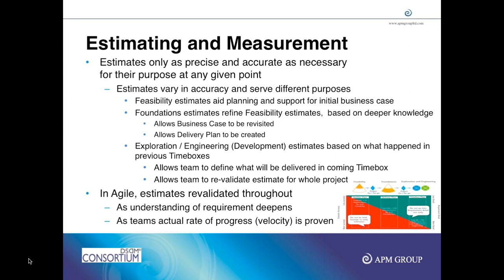All stories should be below 21. If any story comes in more than that, you can ask people to divide it into further requirements. That way you have manageable requirements. If anything comes out to be 100, that's a project in itself, a very big requirement, so can we cut it down into some more requirements and then rate them again? So you identify epics, and you identify stories that are manageable.